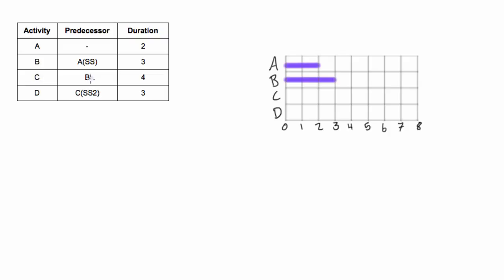Activity C depends on B, this is just regular finish-to-start relationship. You don't have to specify finish-to-start because that's the basic relationship we can have in a Gantt chart or any type of project logic. We'll find the end of B and that's where we'll start C and it's four days long. So C starts at the end of B and it's one, two, three, four days long.